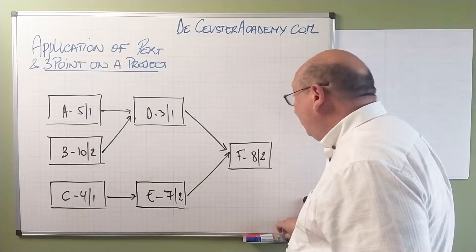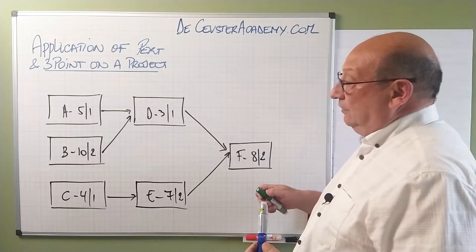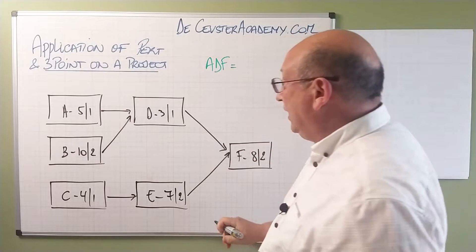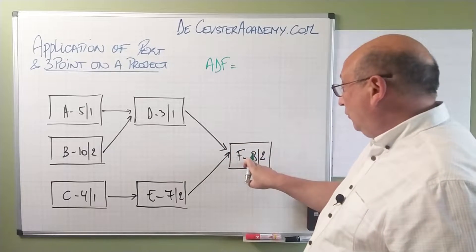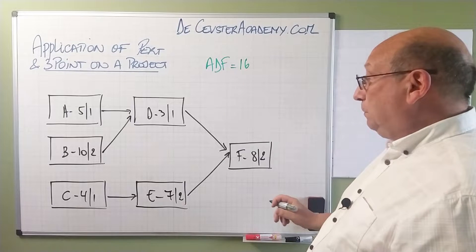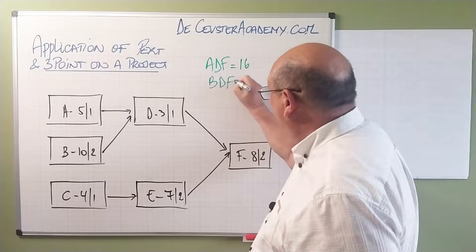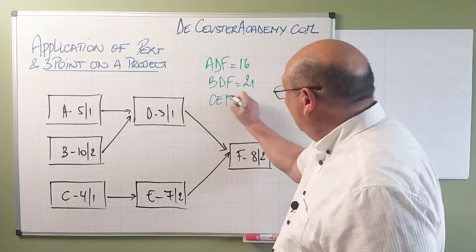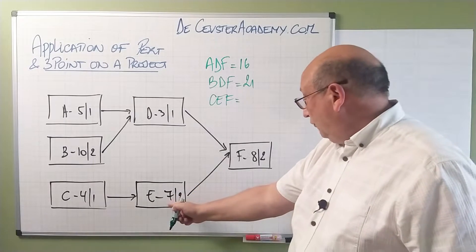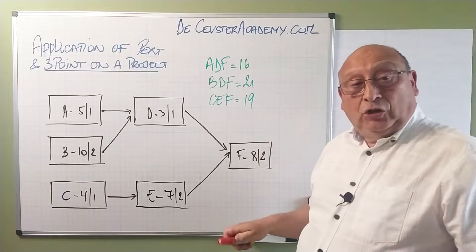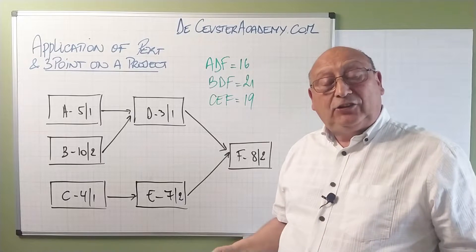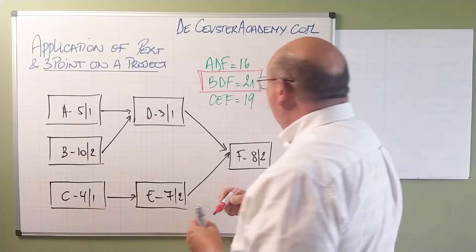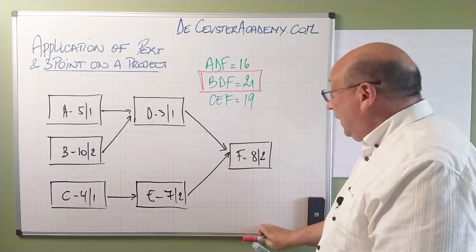What we have to do now is, for every path, calculate the duration. We have the path A-D-F, which has a duration of 5 plus 3 plus 8 — that's 16. Then we have the path B-D-F, equal to 10 plus 3 plus 8, which is 21. And then the last path is C-E-F, with a duration of 4 plus 7 plus 8, which is 19. Remembering the definition of the critical path, the critical path is the path with the longest duration — in this case, B-D-F.